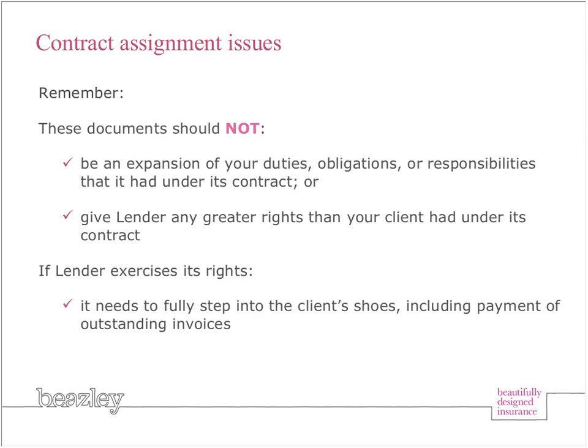Again, industry standard documents. I know this is an engineer group, but to the extent that your architect clients are using AIA docs and then using the C401 with you, keep in mind that in 2017, the AIA added some nice language saying that when the lender steps into the client's shoes, it includes taking over any payments due to the professional that the owner owed prior to the assignment.